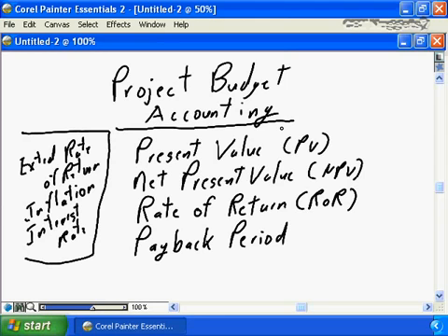I keep saying you may or may not need to do. If you're dealing with a short project that covers a 6-month window, I would suggest, and I think I would be very accurate with this, you will need to apply none of these accounting principles, because the present value of money now and the present value of 6 months hence is very much the same. There's limited application of inflation or interest rates on that money. But if you're dealing with a project that covers 2, 3, or 4 years, then in all likelihood you will need to work with your financial analysts to work through the present value of money and discounted cash flows, because then your project will be very much impacted by inflation and interest.